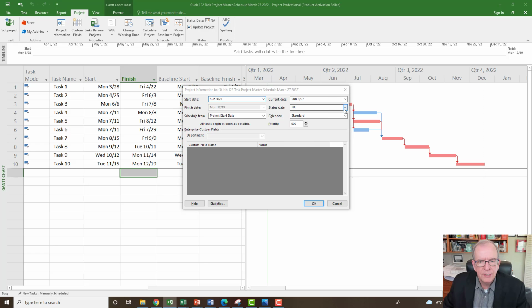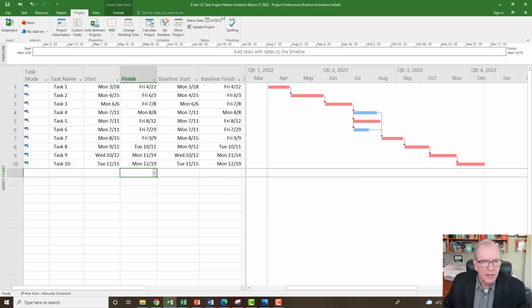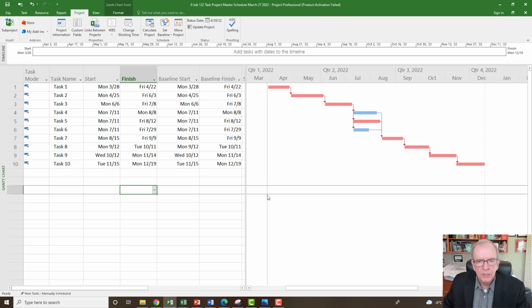I'm going to go status date. Right now it's showing the 27th of March. And so I'm going to put it down as the 29th of April. And I'm going to click OK. And so now I've got that status date, and that actually should show it over here. So status date April 29th, and the year in this case. And I don't see anything over here, but I'd like to see the status date line.